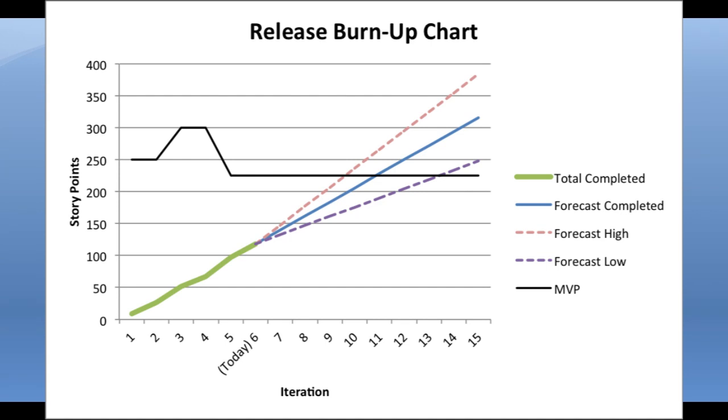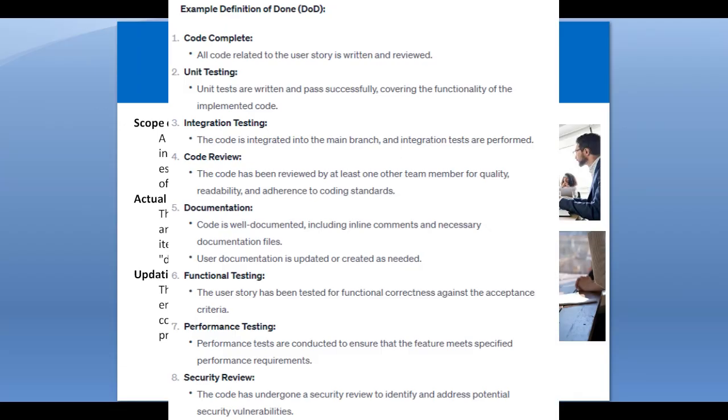Basically friend, whenever we are starting or initiating a sprint, the definition of done must be defined. The definition of done concept here is the criteria at which we will accept that the work has been completed. Obviously this definition of done should be derived from the customer and from the business point of view. That means the criteria at which we will accept that work has been completed, and we can mark the task and the deliverable as finished. So this is basically the criteria of done.